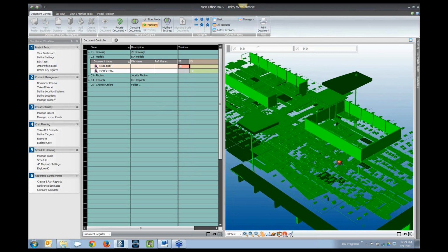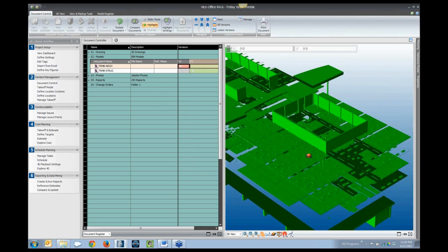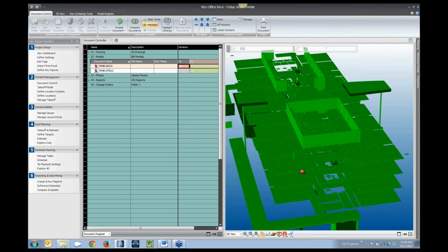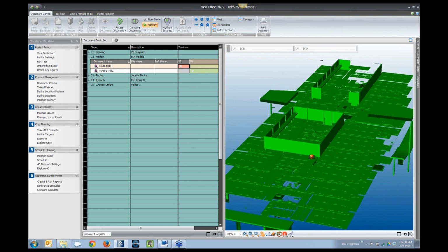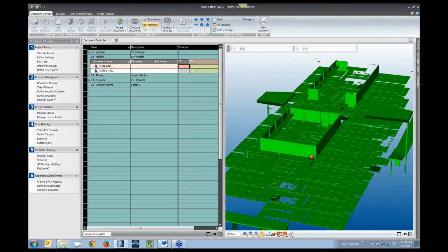So if I need to communicate to the rest of my team, say my cost planners or my cost schedulers, about which part of the project I need updated, right away, as soon as I get the new design release, I don't have to spend a ton of time trying to figure out what has changed between the two. I can just look and see that everything displayed in green right now has been newly added in the last 2 weeks since I got the model update.